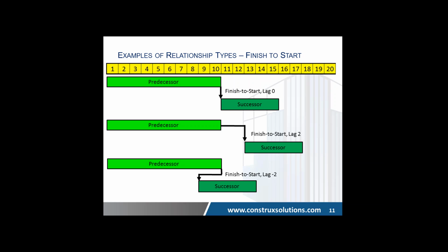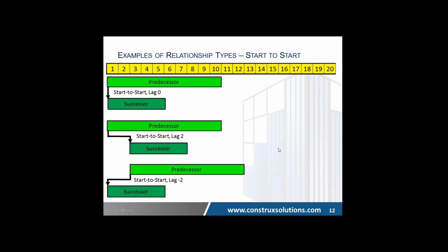Any number of reasons people may disagree with it. I don't really see a problem with this. I certainly see many activities, particularly longer activities, say a 10 or 15-day activity of pouring concrete or installing windows, where something behind it could happen 2 days before it finishes, and you know that, and you should set it up that way. I don't really see a problem, but I will talk about negative lags that I do see a problem with.